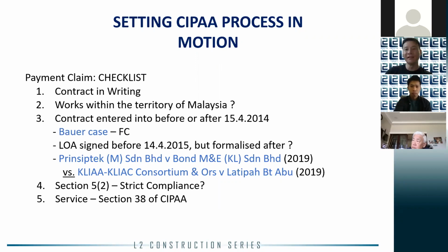Now, another thing that you have to take note of is the service. As you know, we have a special provision, Section 38 of CIPAA, which requires the document to be served via certain standard modes as set out in the provision. If you want to have other modes apart from those provided in the provision, like email and fax, then you have to have an agreement or show that there's an agreement between the parties that that would constitute a valid service as well.